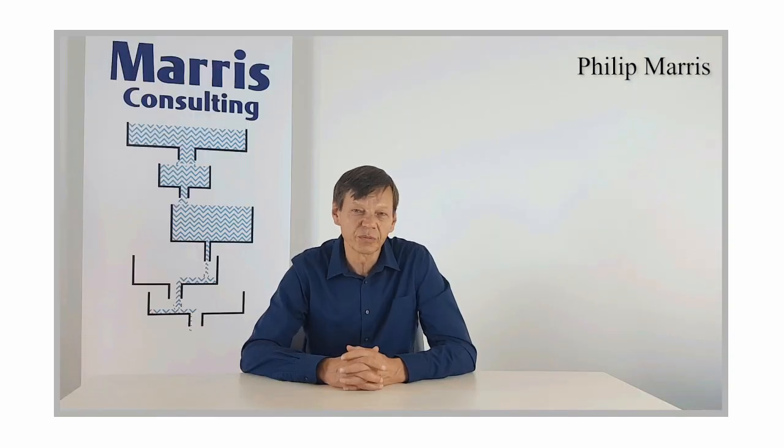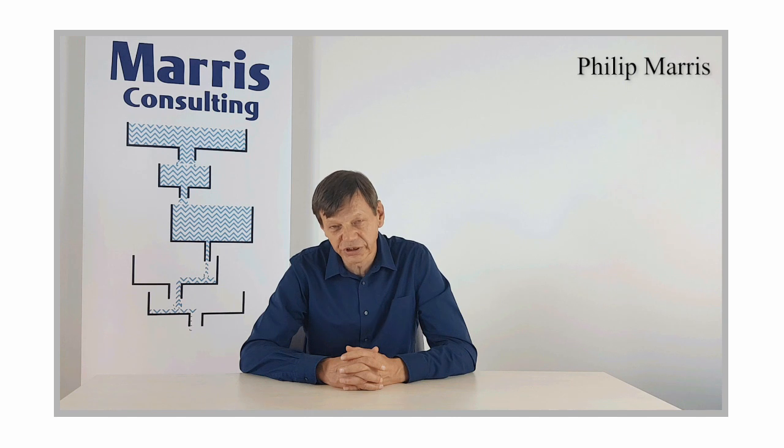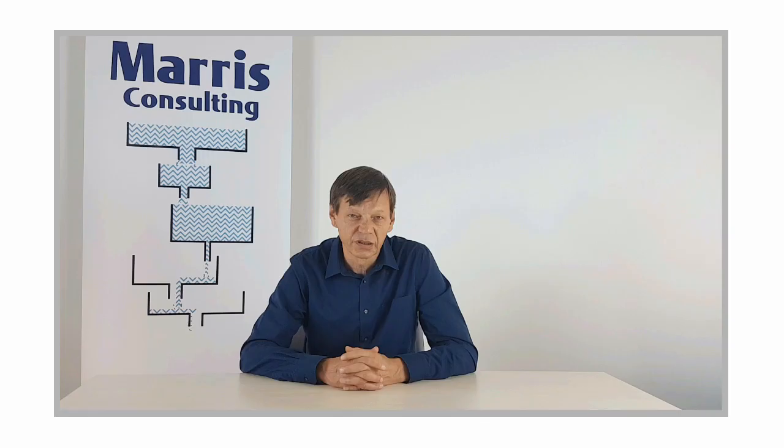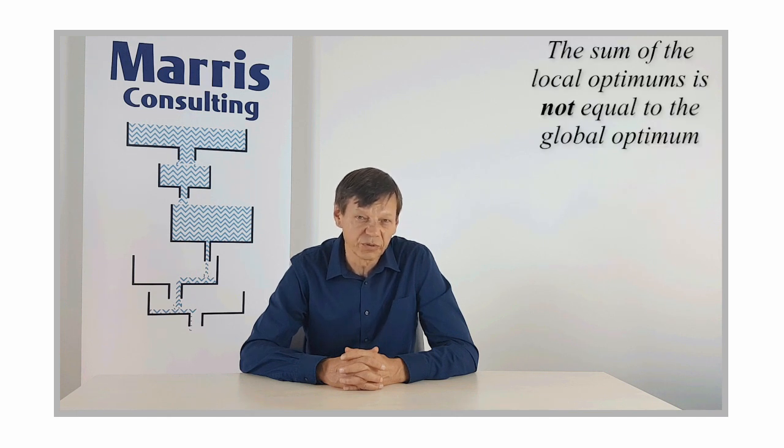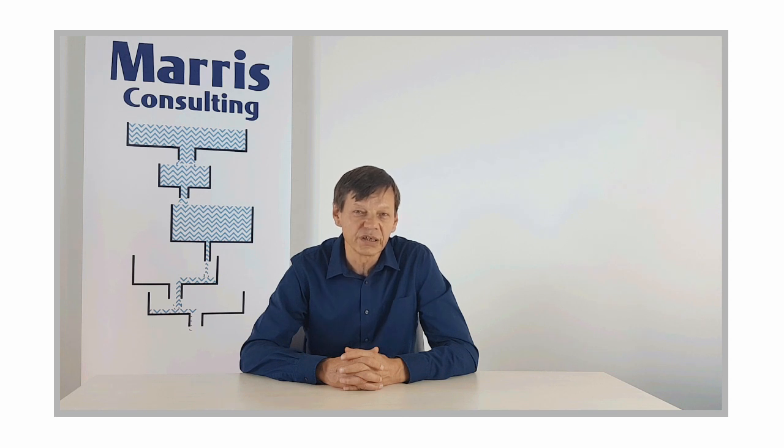Okay, so that was a brief video about all the problems you will encounter managing projects in the traditional way. Please note that the underlying assumption that was there throughout, and that maybe you are using, is that to finish your projects on time, you must try and ensure that each of the tasks finishes on time. You're assuming that if the tasks finish on time, the project will finish on time. In the theory of constraints, there's a saying which says, beware, the sum of local optimums is not equal to the global optimum. And in fact, in project management, striving to meet the task durations of the individual tasks actually kills the project. Okay, so we will now be looking at how Critical Chain rethinks the planning and the execution of projects to increase performance and make it a lot healthier environment.